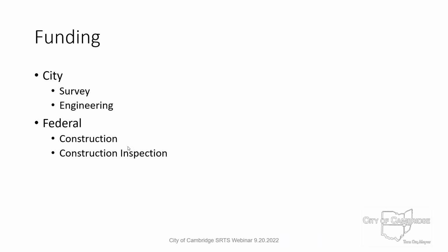Funding for this particular project, we did utilize Safe Routes to School funds. Those funds were for the construction and construction inspection. The city funded the survey and we did the engineering in-house for this particular project. And then I believe that concludes the slides that I prepared for this presentation.